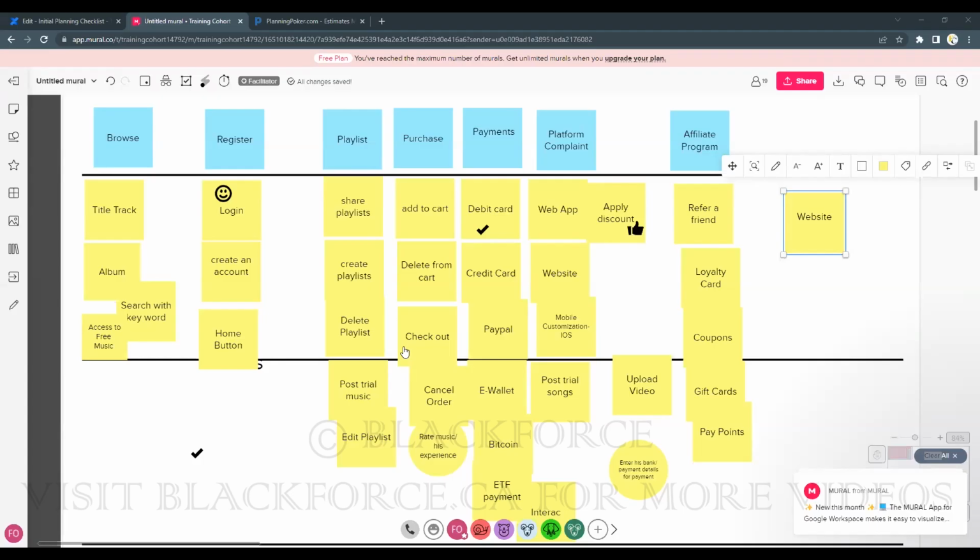Yes, it's team dependent. It determines your allocation, your capacity. If someone's allocation is 50%, you don't expect the velocity to be the same as people that are 100% on that team alone, whose own job is just that product, right? The velocity will be different, okay?